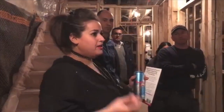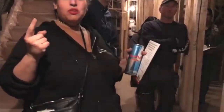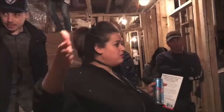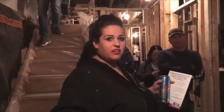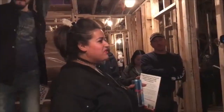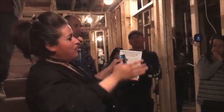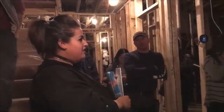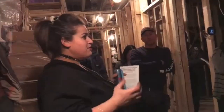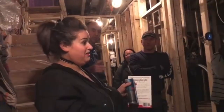And the rule of thumb is, and Adam can clarify if he is here. Is he here? 7 to 1, right? 7 to 10. Okay, so 7 inches out, 10 inches down, right? The other way around. 10 inches out, 7 inches down. So basically, if you want to go 2 feet, you're going to have a quite wide bench on that shared wall. So you want to be friends with your neighbors right off the bat. Even if you are investing in the property, introduce yourselves to them right off the beginning if your intentions are to underpin.